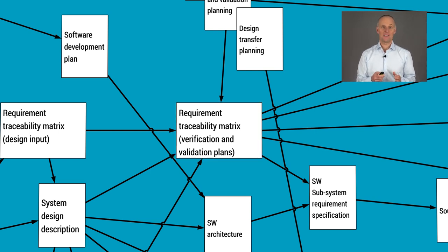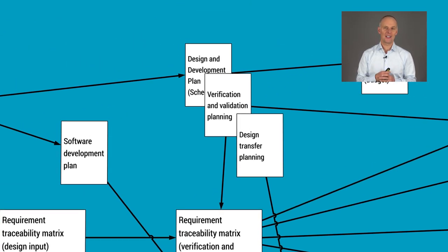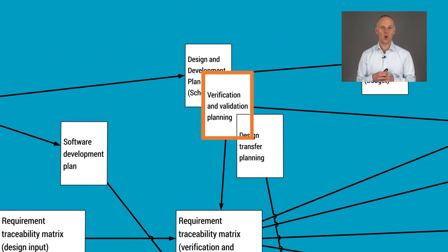When that has been done, and if it hasn't been done already, you should also be planning the verification and validation of your product on a high level. In fact, it's a requirement to plan verification and validation according to ISO 13485. And while you're at it, also the design transfer should be planned, which is not surprising since it should be an integral part of your project.